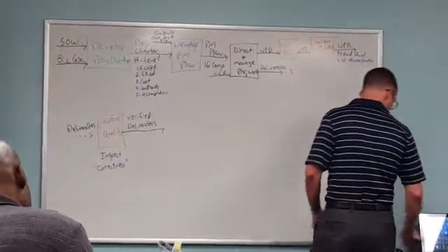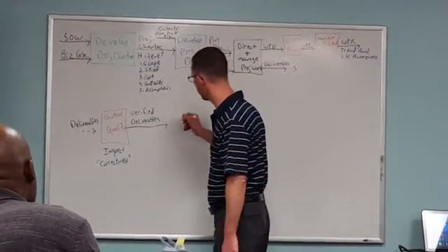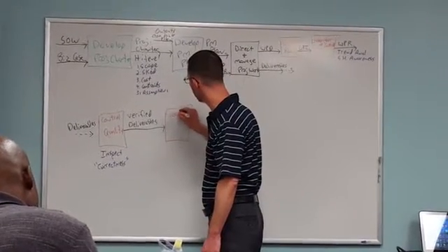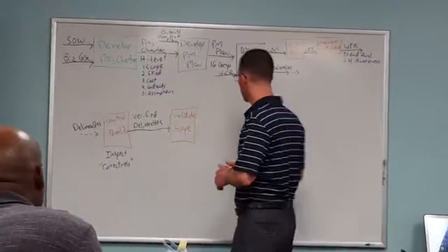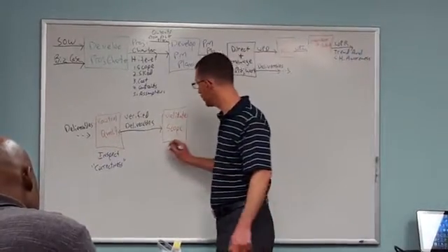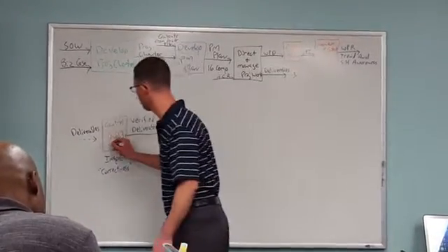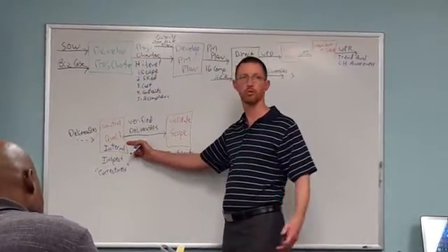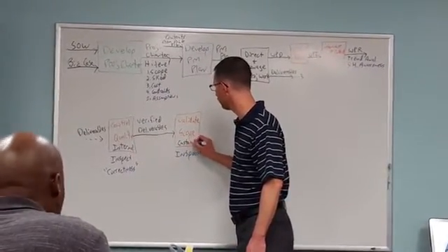Okay, so those verified deliverables are going to be an input to yet another knowledge area, scope, but a monitoring and controlling process. And that monitoring and controlling process is going to be called validate scope. So validate scope is also about inspecting the deliverables, but this time the inspection is not going to be done by my internal team. So I'll have to put this right here. This is internal. This is an internal quality inspector, someone who's an expert and knows. And this over here is external, or we'll put customer.